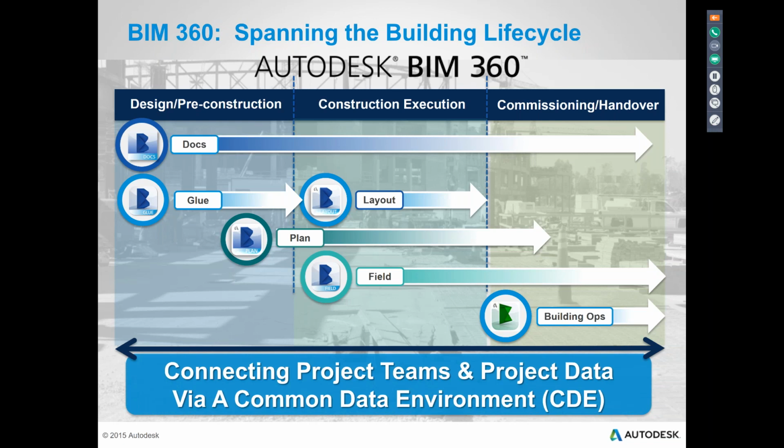There's all kinds of different nomenclature there, but that's what BIM 360 Plan is all about, is that lean construction methodology of taking an overall master schedule from something like Microsoft Project or Primavera P6, loading it into Plan, and then being able to break it down into a smaller micro segment, so down to the individual subcontractor level, so the subs can understand what their look ahead is. What are they doing in the next week or the next 3 weeks on site?